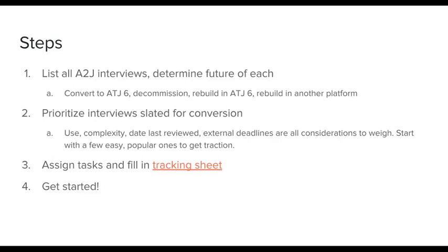And once you've decided what interviews you are going to convert, then it's the best practice to prioritize them. Considerations are the use. You know, you want to start with your most popular ones, but you also need to look at complexity. We don't recommend that you start with your hardest interview, even if it's the most popular, because there is a learning curve to this whole process. You want to make sure that you start at a good place.